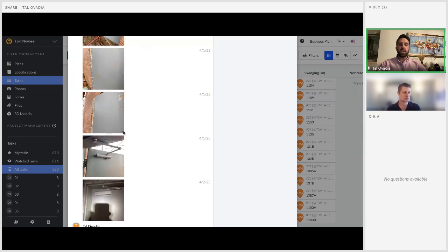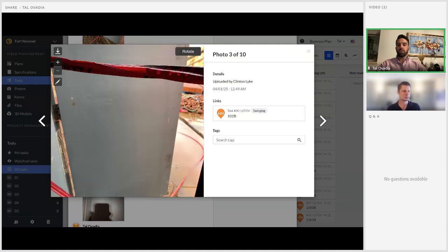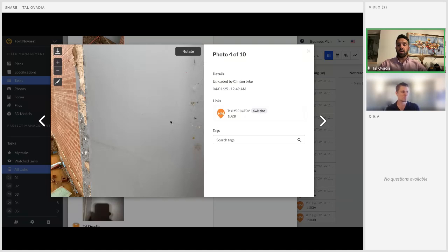So we can see my employees are very good at taking photos. This obviously was not installation damage. This was damage from shipping. But we were asked to swing these doors anyway because they had to lock up the space. So what we're doing here is saying, hey, at the time of installation, this damage existed. It was not BMA. And we can produce a report to show that any given doors that might come back on a punch list later on were not damaged by my crew.